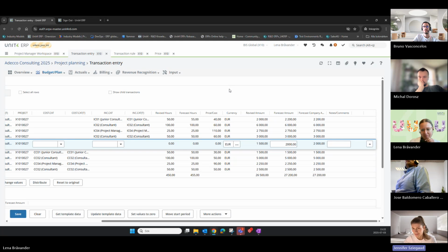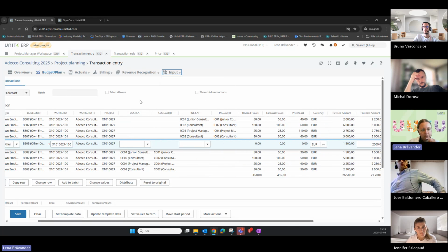You were mentioning that you cannot work on an individual resource level, but only on the category. What are the challenges that arise from that? That I can't track individual costs? Yeah, exactly. That you can't track the budget or forecast by an individual, but you can add the resource here, but it wouldn't be very user friendly, especially if you're adding these manually line by line, and you do this by resource in a big project. It's just not going to work. But if it's automated, then it's a different thing, right?